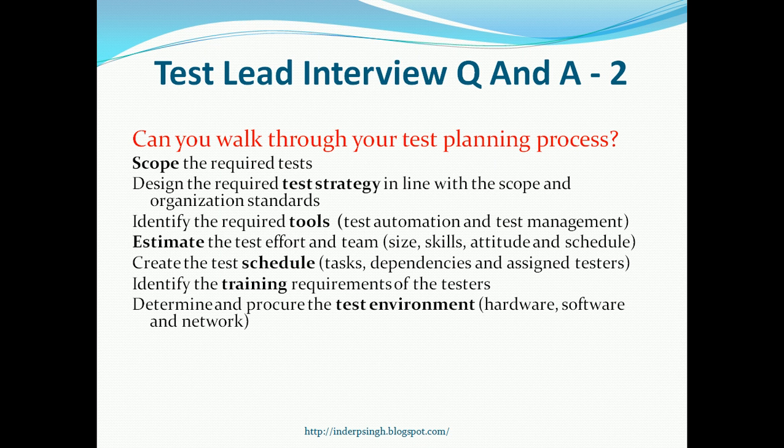Test environment is an important part of testing. So the test lead has to determine what is the test environment that is required, whether it is a replica of the production environment or whatever hardware, software and network is required. So the test lead determines the test environment and makes sure it is available before the testing begins.